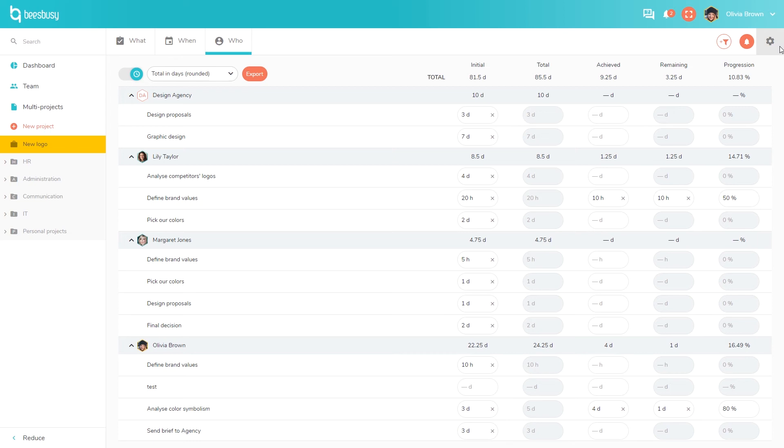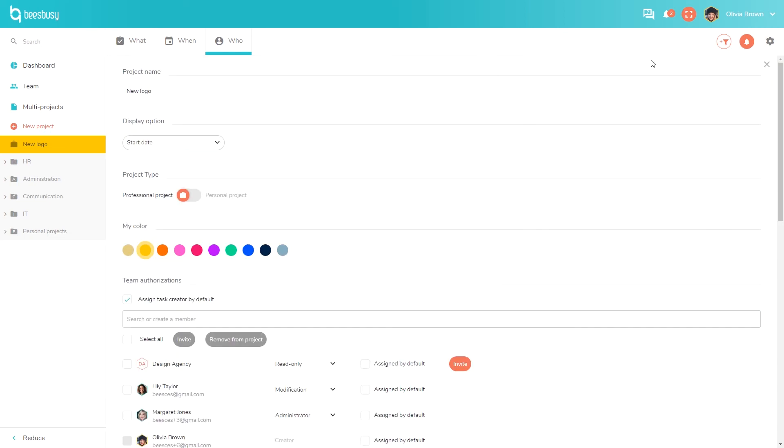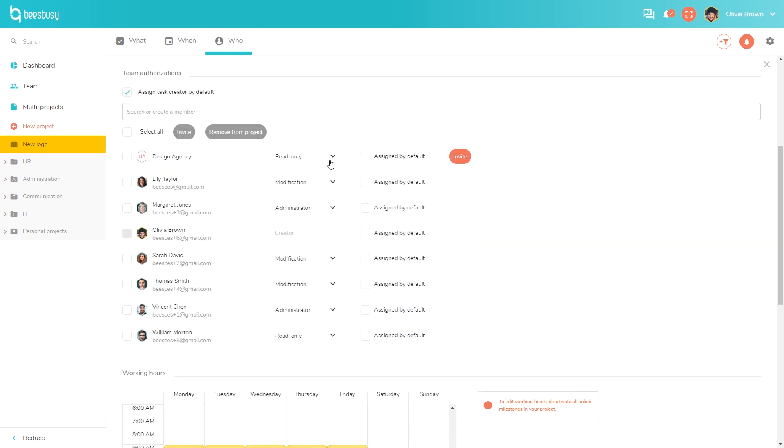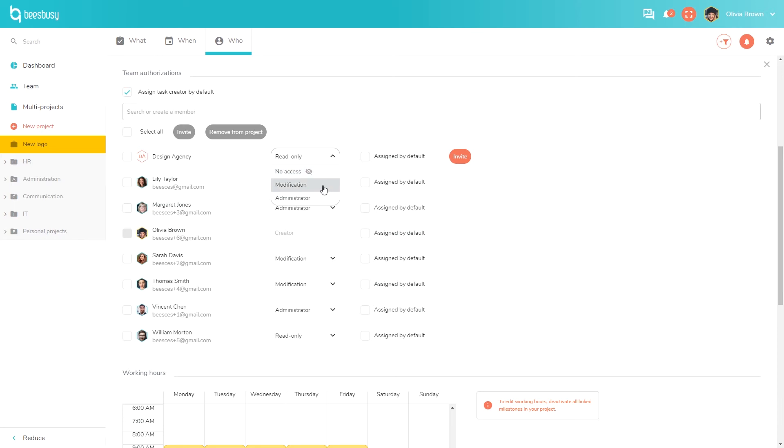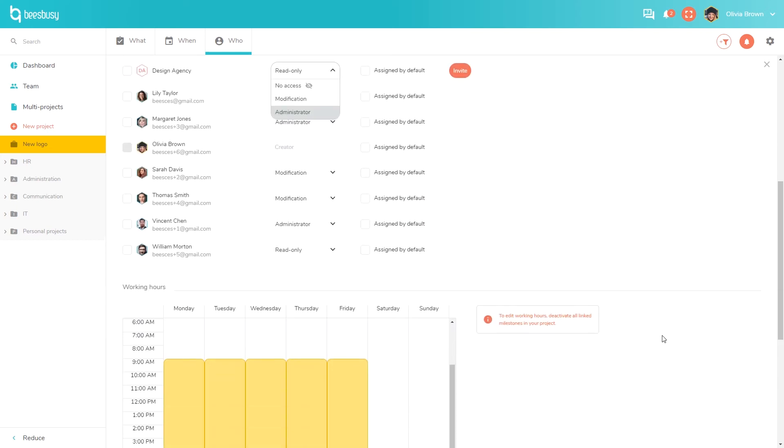For each project you can edit the settings. The project colors can be changed here. And you can also invite members here and manage their access rights. Different statuses are available. For example, no access if you want to take the user into account but you don't want them to see the project. Read only means the user can add comments, mark actions as completed and add their time, but they can't modify the planning. Modification means that the user can create tasks and modify the planning. You can also have several admins on the same project. They can duplicate a project, invite members, and so on.